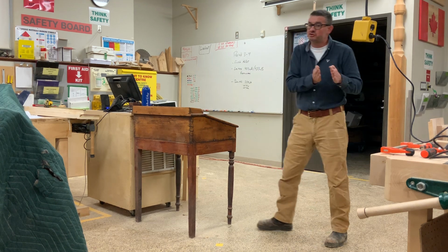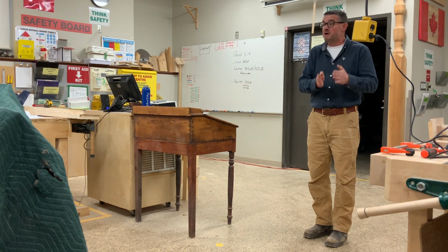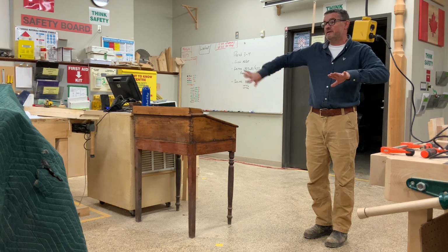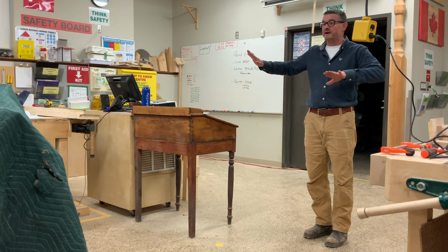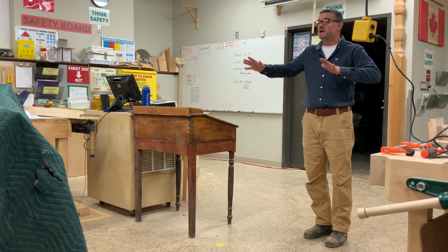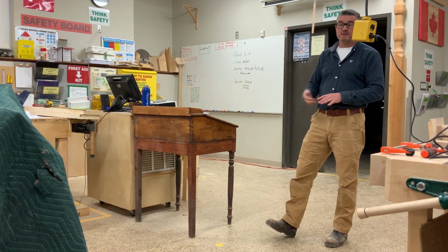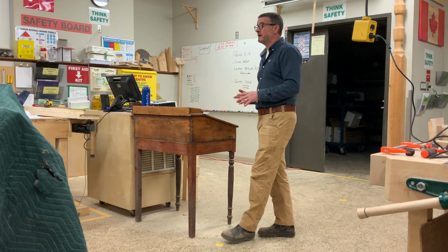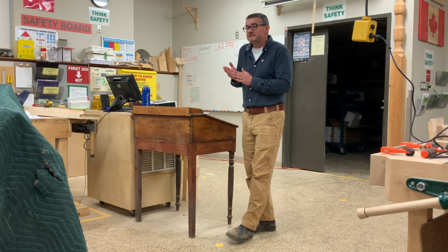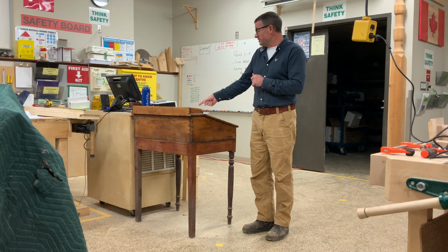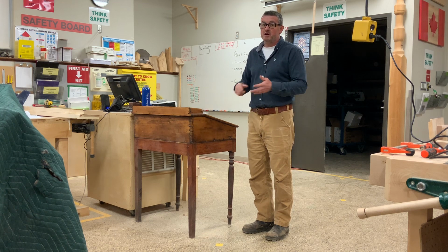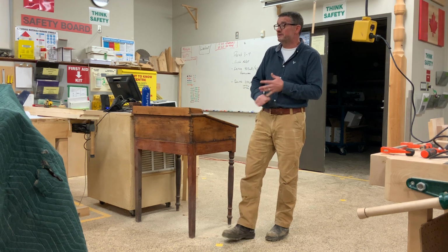So we have a contract we've all signed. Our company has signed it, we're bound by it. The homeowner has signed it and they're bound by it, and all the subcontractors in between. But then things change. Big snowstorm, COVID, whatever it happens to be. And so as they change, we bring out a new contract called add, edit, delete. Okay, you want the bedrooms a little bit bigger now that you've seen the layout?